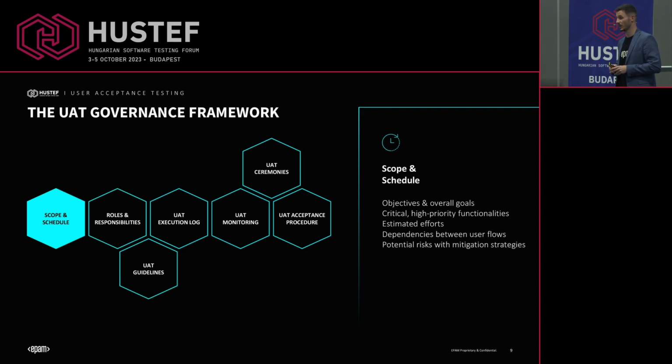A typical problem can be that we are working on an integration project with many different teams, and the question can be asked, okay, how can we validate that everything works as expected? And the same goes for the last point: it's really advised to collect the potential risks with mitigation options in case of occurrence, which can set the context at the beginning.